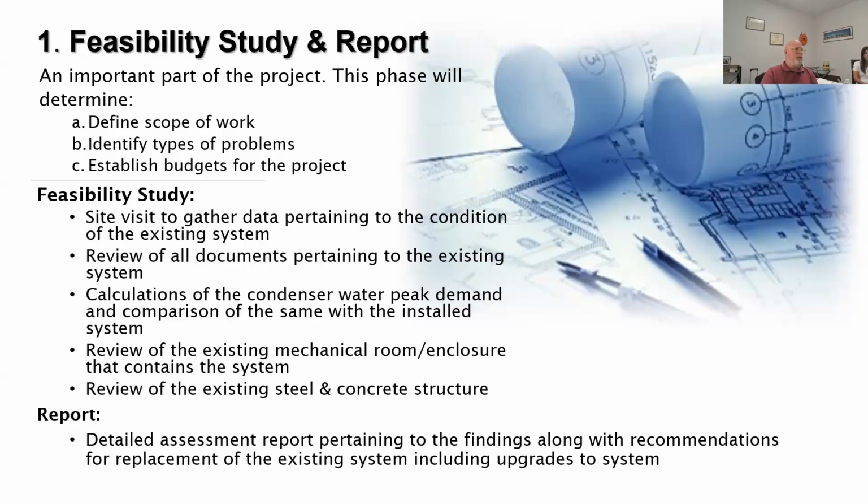And so that's why, again, the feasibility study is good, because we'll go onto the site, we'll document everything that's there. We'll come back into the office. We'll do some calculations to make sure if the existing tower is what's needed, or if we need to upgrade it. And then the very important part is we'll review the steel and concrete structure to see, is it going to be a minor upgrade?